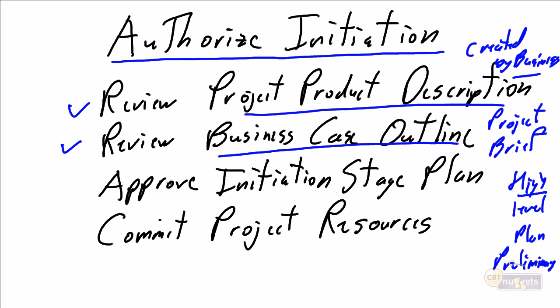How many other words can I put in there that says we don't have a lot of accuracy? We have accuracy plus or minus as a minimum of 100%, and it could be an even broader range than that. So although we may be going in and saying this is going to be a $50,000 project, what we're really saying is this project could range anywhere from a low of $25,000 to a high of $100,000. And I recognize that's a very big range, but that's the degree of accuracy we have at this stage.